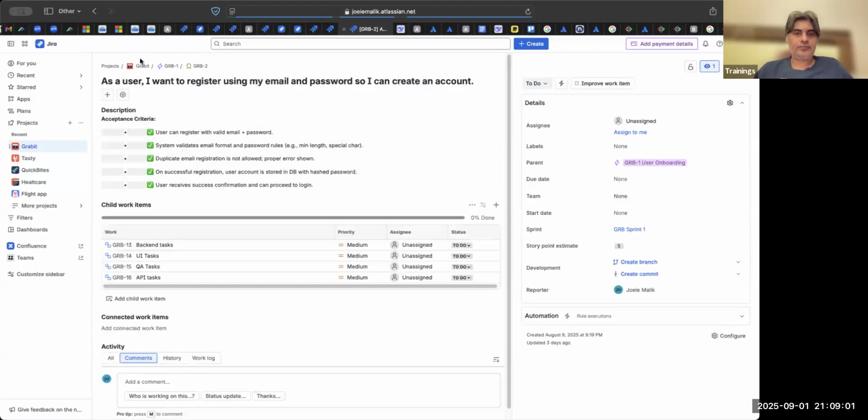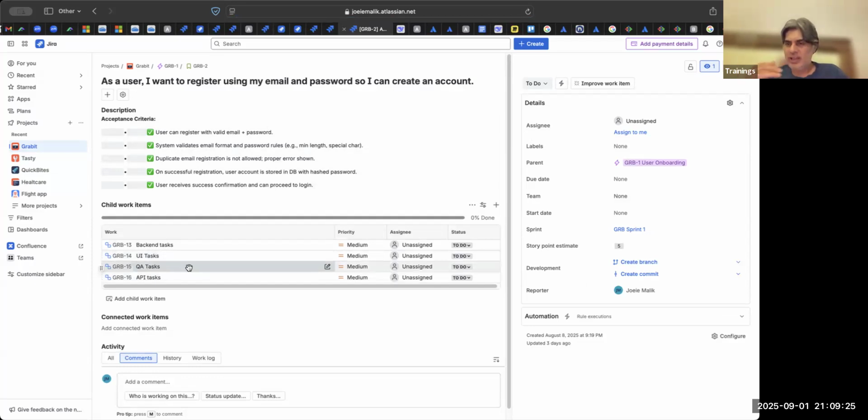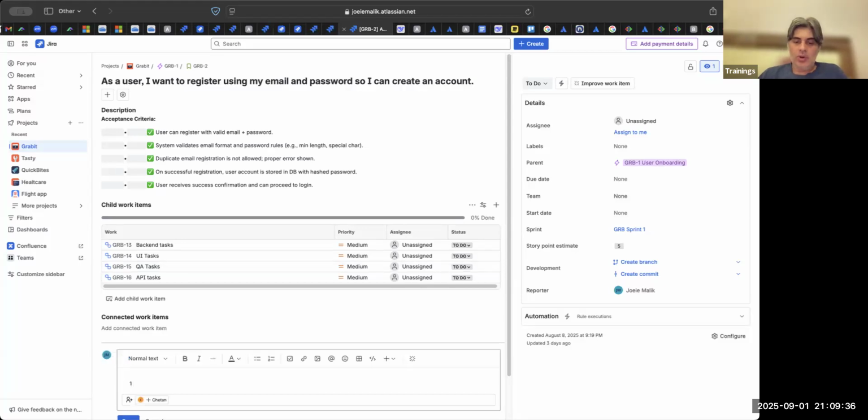So this is a story. Now let us say, for example, you don't have full stack developers, or this is a new team in Agile. You have two UI developers, two backend developers, one Java developer, two QAs, something like that. And the organization is saying that, boss, you have to estimate in hours. So we say one story point is equal to 6 hours.